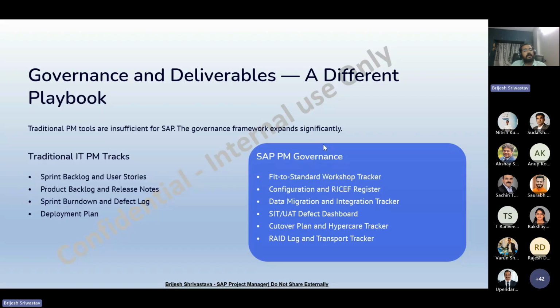Whenever you are doing the project impact risk assessment, you need to involve your architect, solution architect, the support team, the compliance team, and the IRM team. In the PIRA process, project impact risk assessment, we have a checklist. Based on each checklist item, these stakeholders, the architect, support team, and IRM compliance team, are going to ask a number of questions.